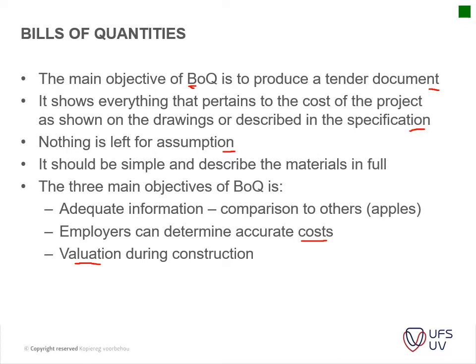If you only have a quote from a contractor per square meter of a new construction or house construction, it is usually difficult to determine exactly what's due to the contractor, because you can't measure it and compare it to what he quoted. So you will have a percentage maybe that you allocate to the progress of the project, so it's not that accurate to actually price that. It also assists, which is not mentioned here, in your cash flow projections, but we'll get to that later on.